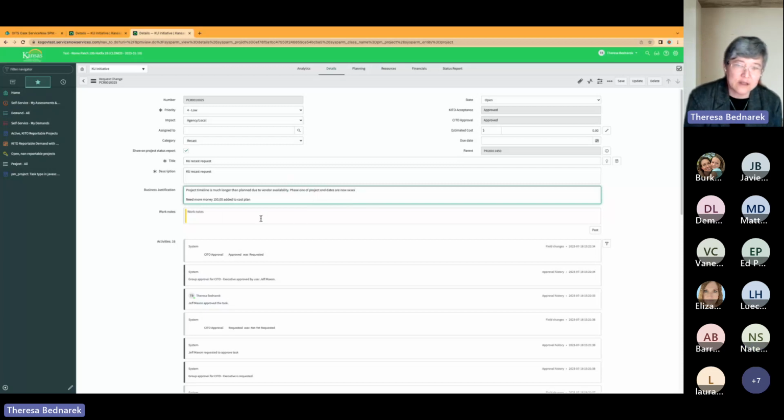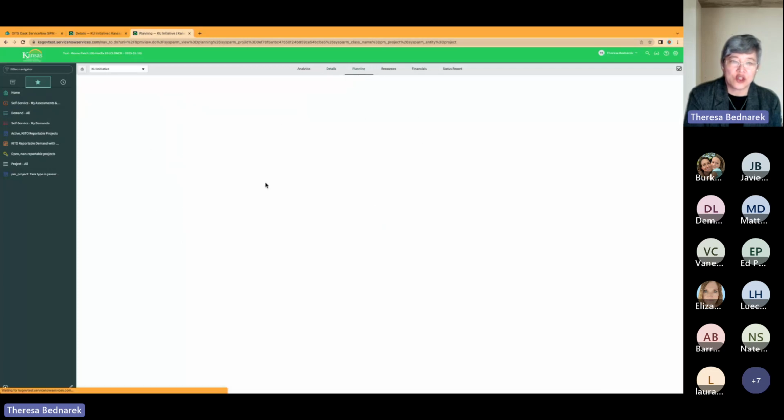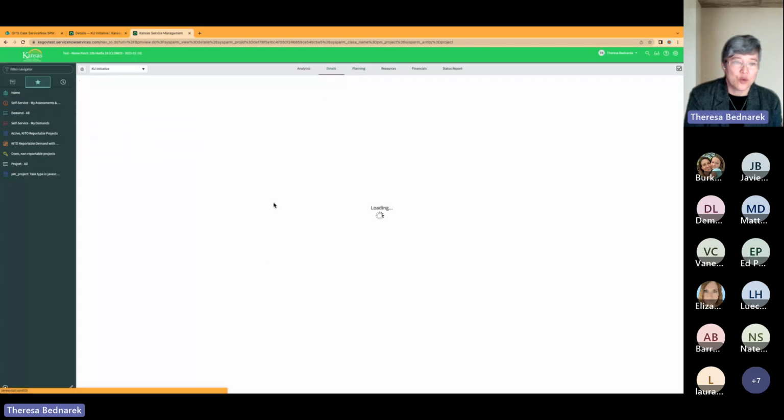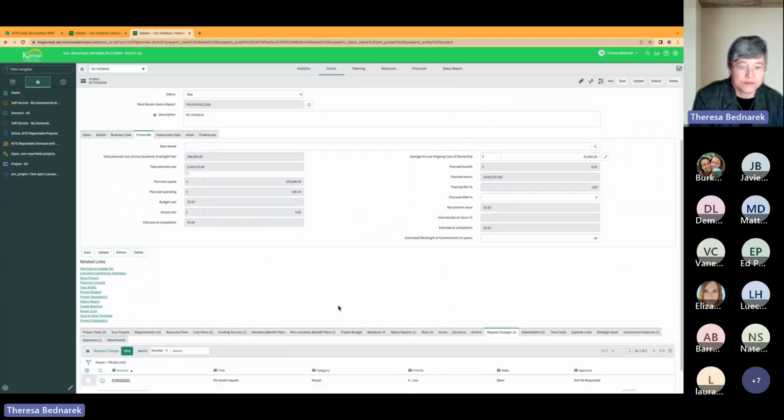So you want to reflect those differences within your business justification so that it's understood what that change is. And once you get this approval, then yes, you want to change your schedule here and update your financials down here. Does that help?